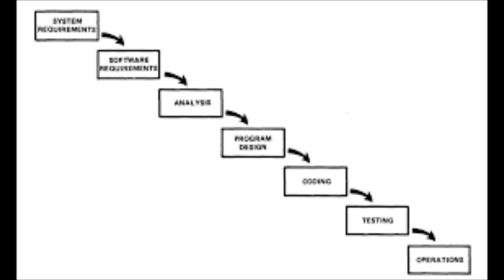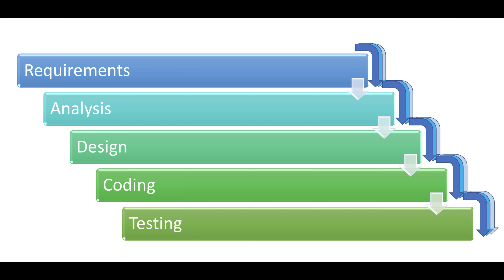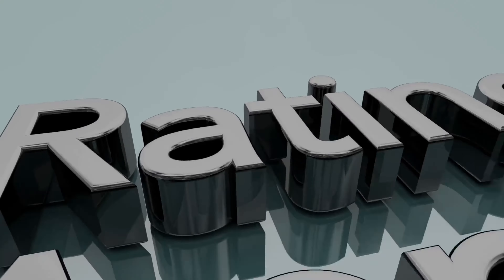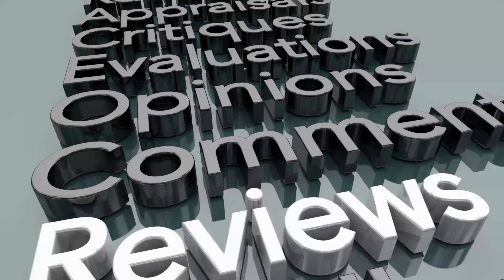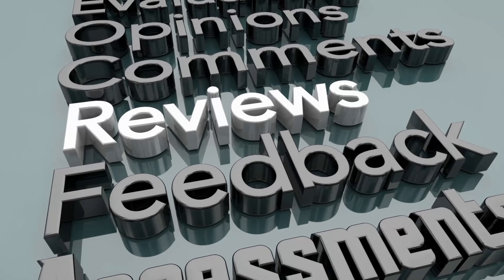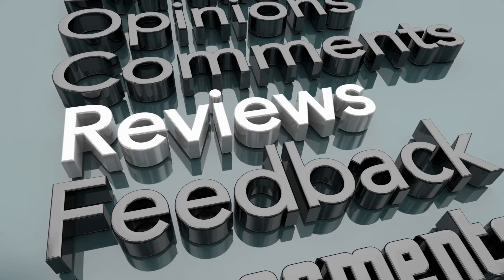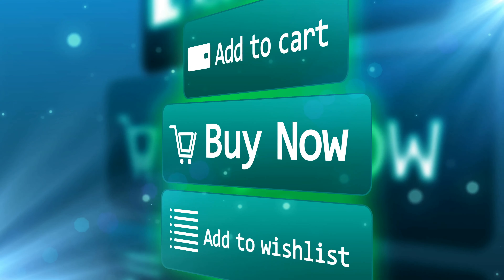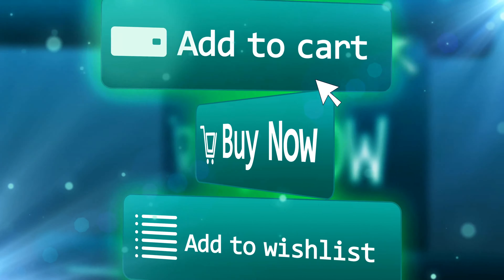What Royce describes in the initial part of the paper is what came to be called the waterfall approach, which was adopted widely by the industry. Interestingly, Royce actually described this approach as risky and inviting failure, and he continues to describe what is actually a more iterative approach. One of the major risks of the waterfall approach is that there is generally no customer feedback until the entire product is delivered.